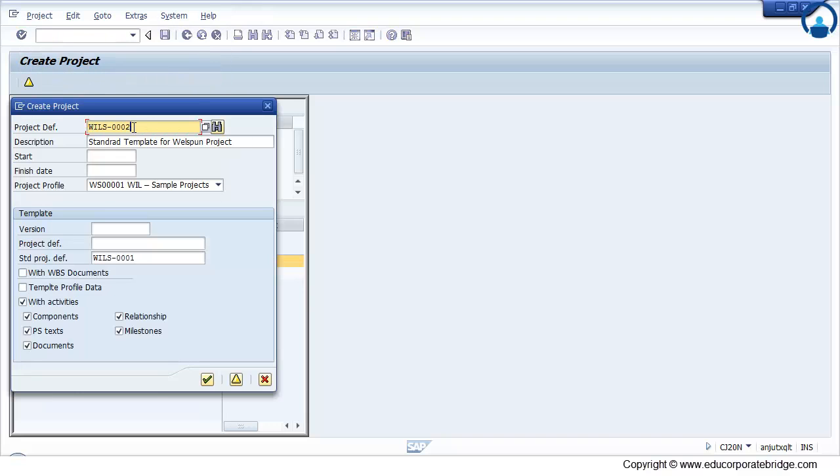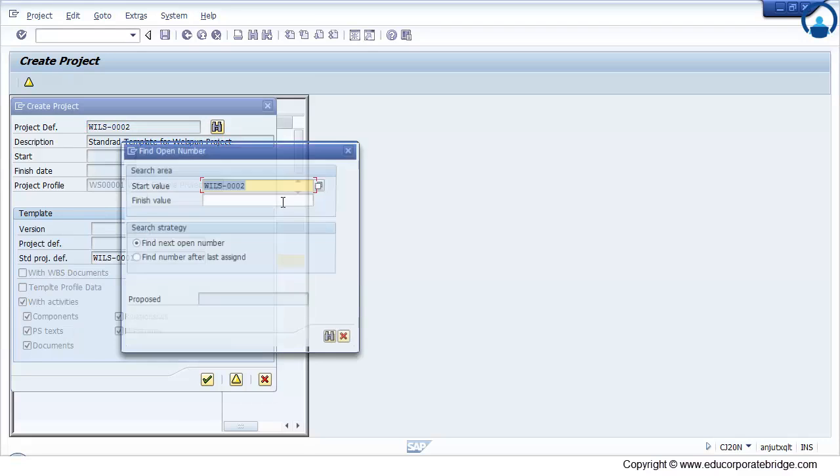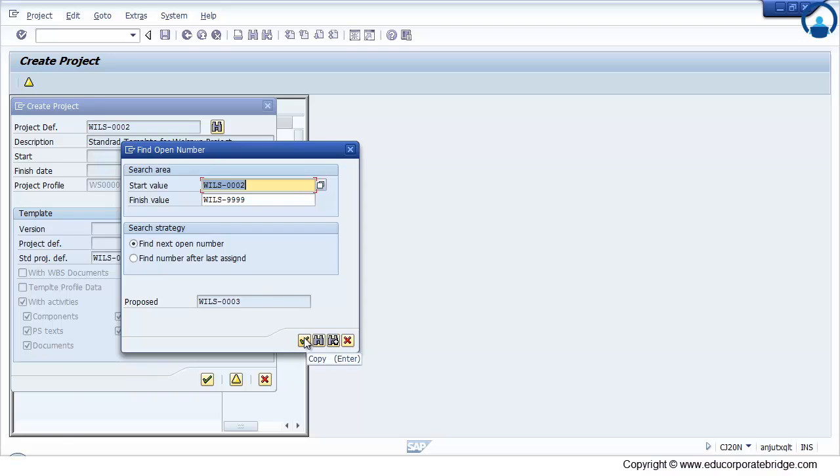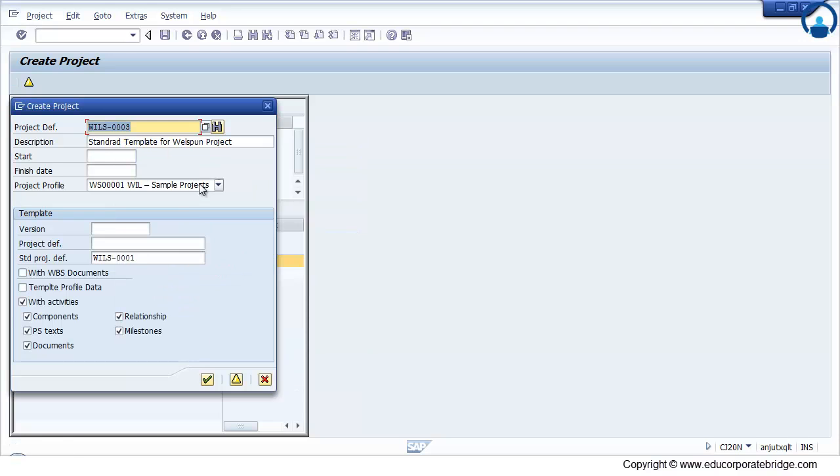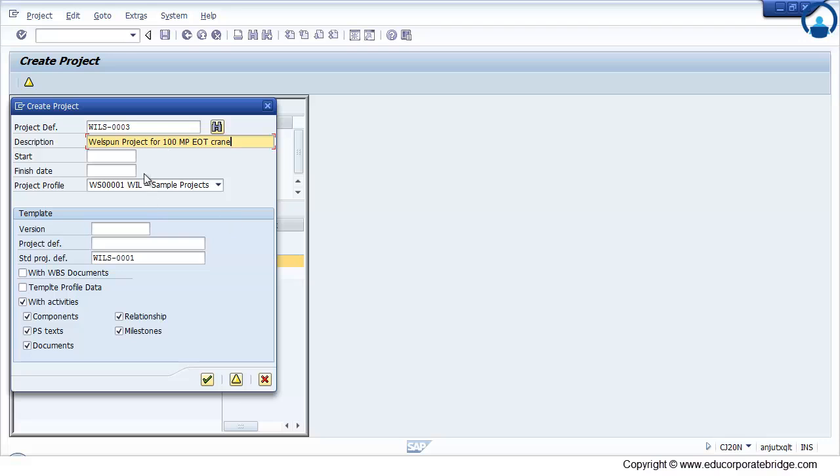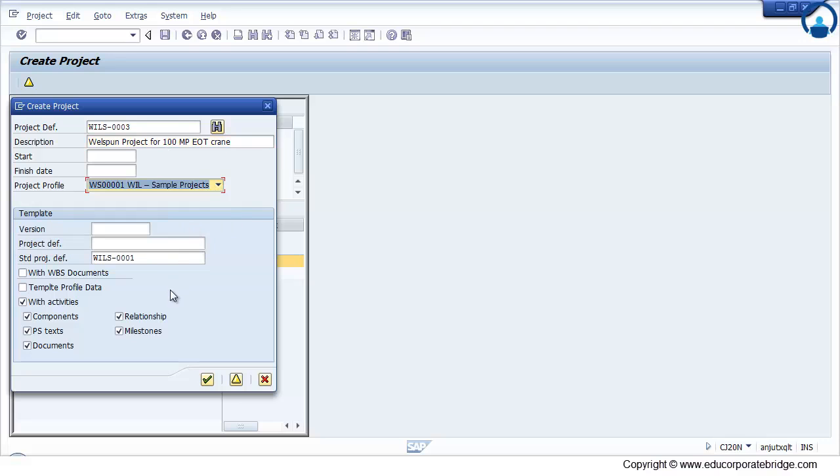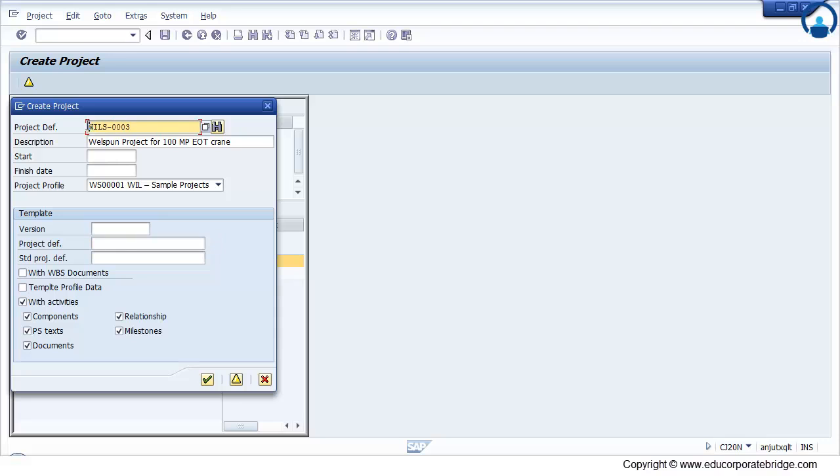You have to provide a WBS. Again you click here, system will propose you the next available number. Just provide a description. Just select the appropriate project profile. Remove the standard template and maintain the operative project from which you need to copy.